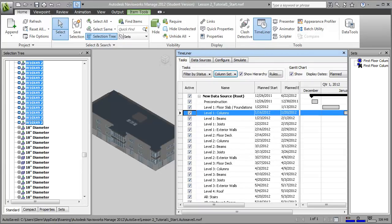While working with search sets greatly improves our ability to pull together the different building elements needed for each of the tasks, creating those search sets based on element properties like the element name or type is still pretty cumbersome. So let's look at another very powerful strategy for working with the parametric capabilities of Revit and those search sets to make it much easier to link building elements to specific construction tasks.